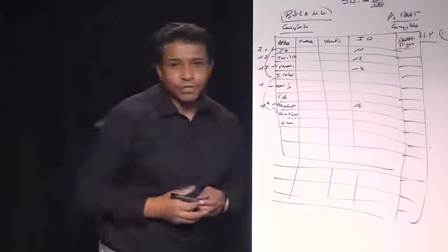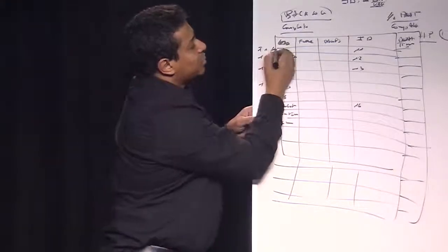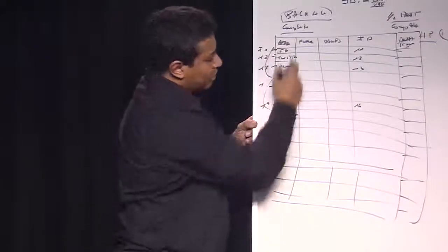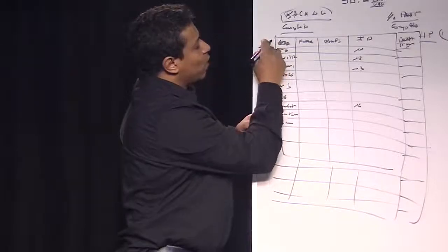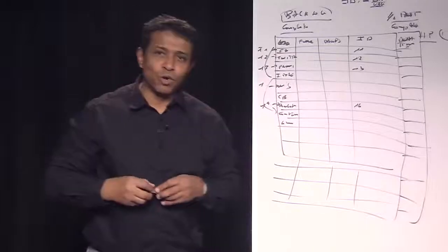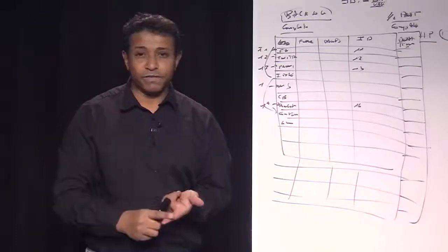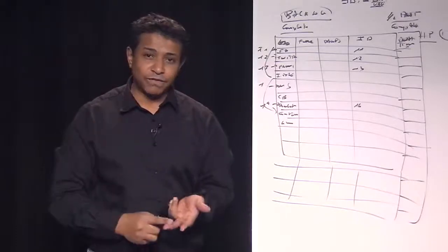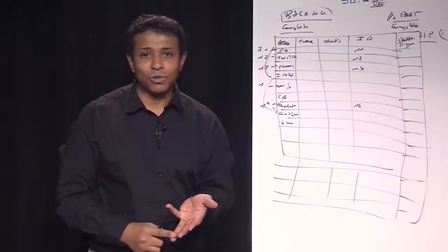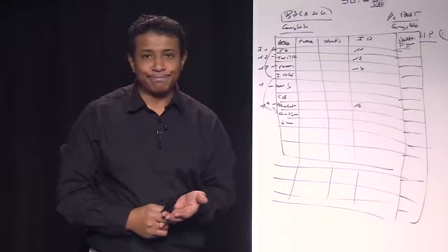This column duration will help us to know how long it will take to build a FB, how long it will take to build a Twitter, and stuff like that. Just to know if the way we prioritize things can be done in a technical way. This is the role of the product owner. Overview, define the pages, define the priority, define with the Scrum Master what is possible, what is not, and get a retrospective on time.